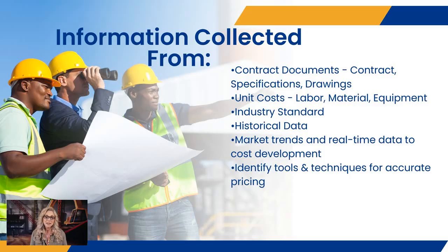And then identifying tools and techniques for accurate pricing. So it just takes work. You have to break things down into smaller components until you feel comfortable of recognizing that you are at the point where you can put together some numbers that really are representing exactly what it is that you are creating. So making sure that we do things like rough order of magnitude, where we identify a cost per square foot, but that doesn't provide a lot of detail. That just gives us an idea of what something is going to cost.